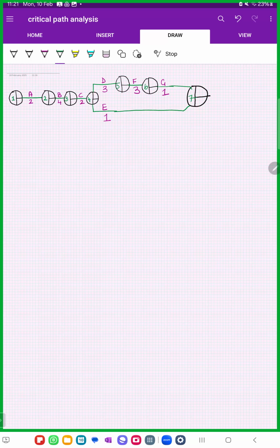They think that at the end of the line, you always have to draw a node. You never draw a node at the end of the line unless there is an activity happening after it. Do you see there is no activity happening after E? So we just kept it as a line. And because that was the last activity on this end, we connect it to the end node. So we have one end node and we connect G and E together on the end node. Does that make sense now? Yes, miss. Okay, so this is all clear for you now.